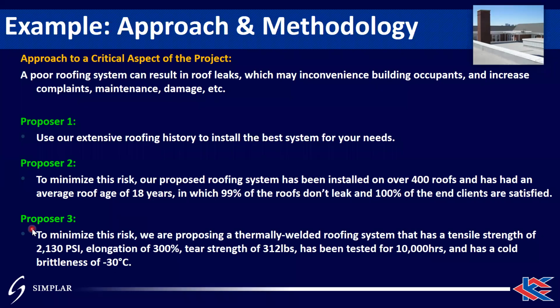And then option 3 said, yeah, here's what we're carrying in our roofing system. We're bringing a thermally welded roofing system. It's got a tensile strength of this many PSI, elongation of 300%, tear strength of 312 pounds. Been tested for 10,000 hours and a cold brittleness of minus 30 degrees Celsius. The question here is which one is the best? Which one earns the most evaluation points typically?